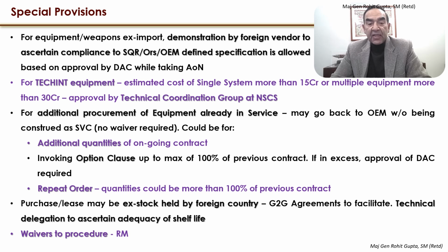Now, purchase lease may be ex stock held by foreign countries. In this, the G2G agreement to facilitate this would be carried out, government to government agreement. A technical delegation has to be appointed to ascertain the adequacy of the shelf life of the stock held with a foreign country before the procurement case goes in.